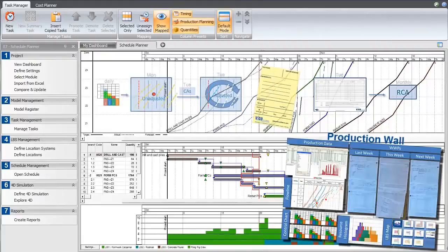The forecasts are reviewed in the weekly subcontractor meetings. Control actions are discussed to mitigate potential problems and are used to make daily and weekly commitments. PPC metrics and root cause analysis are used to support a learning culture and help ensure teams work towards making more reliable promises. The social sharing process on site is done via the production wall. This is a visual display of progress, commitments, and performance.